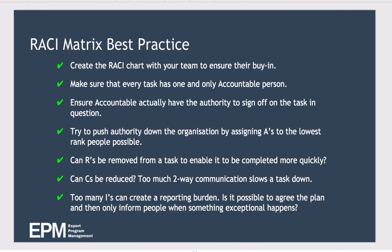What are the best practices of using a RACI matrix? You should create the RACI chart with your team present to ensure buy-in and that nobody disagrees with their responsibility for a task. Make sure every task has one and only one accountable person, and ensure that person actually has the authority to sign off on the task. It's good practice to push authority down the organisation by assigning A's to the lowest rank people possible, so you don't end up with just one person accountable for everything. Also consider whether R's can be removed from tasks, as that enables them to be completed more quickly.